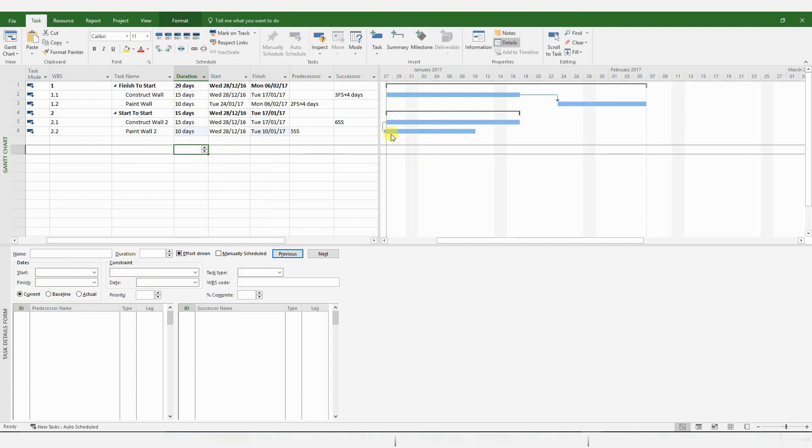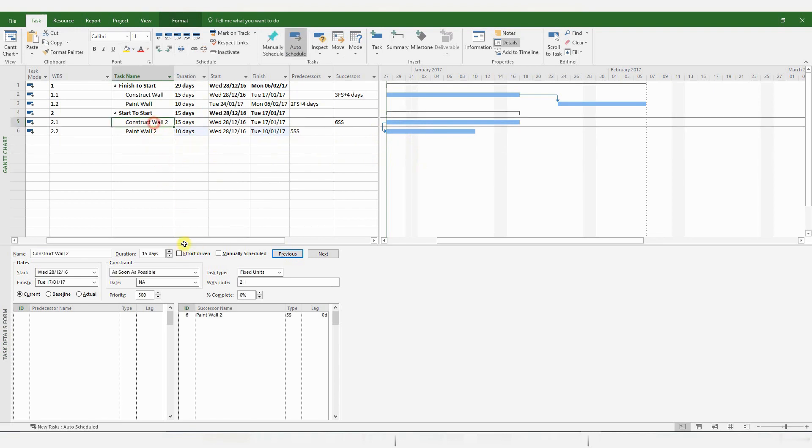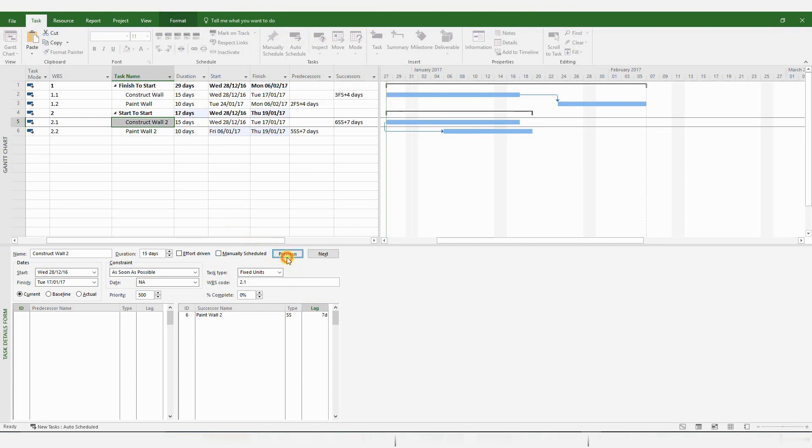Let's make that 15 days and 10 days. So you have a simple Start to Start relationship between these two activities. Now, if you want to create a lag again, you can follow the same procedure. Add a lag in the Task pane, and a lag is generated automatically by MS Project.